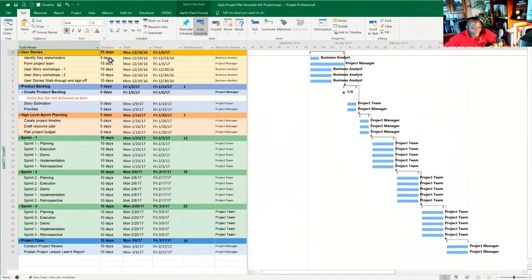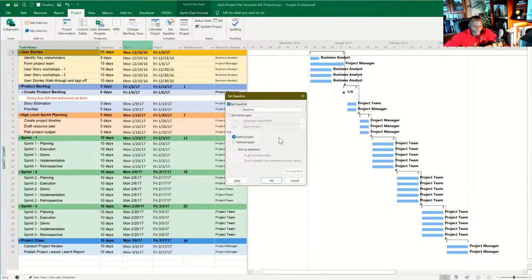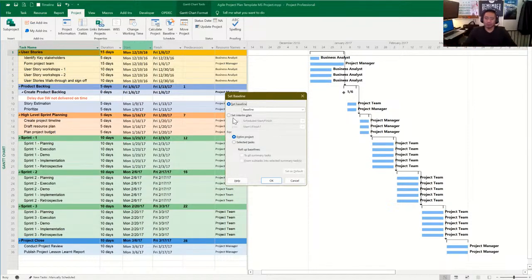Yeah, so Jim hasn't seen that. That's a brilliant idea. So Jim, you can choose to baseline in pieces as opposed to doing the whole thing locked down from the beginning. And based on how things evolve, you could baseline in a just-in-time manner. Yeah, exactly. Like what Darrell is showing. And the interim is called the interim plan.